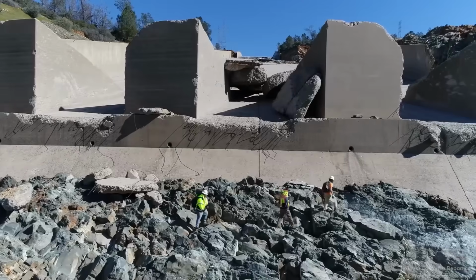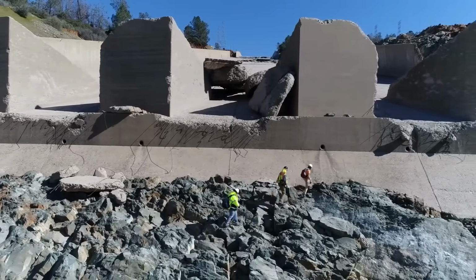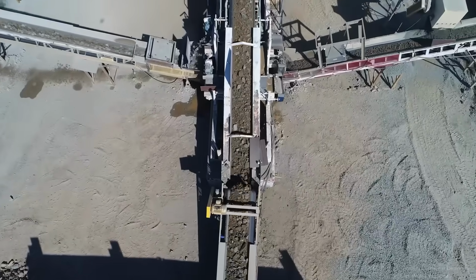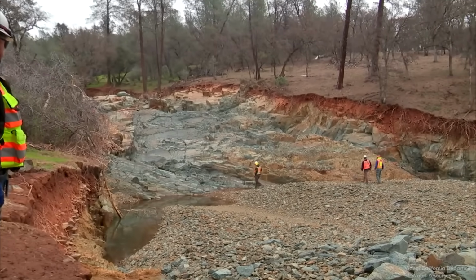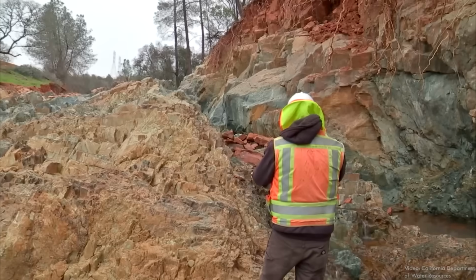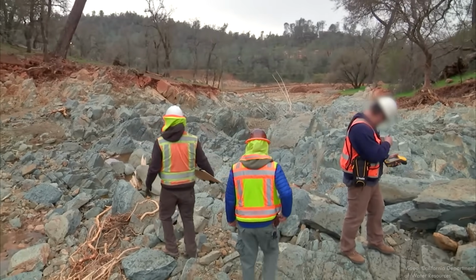This allowed the contractors to get started early to mobilize the enormous quantity of equipment, materials, and workers required for this massive undertaking. Having a contractor on the project early also allowed the design team to collaborate with the construction team, making it easier to assess the impact of design changes on the project's costs and schedule.